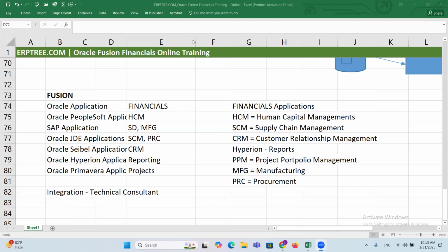Depending on the client's finance, you are gathering the requirement. The very primary core requirement that you gather initially may take a week, 10 days, 2 weeks, or 3 weeks also. It depends on the schedules, how many hours you are investing, and the availability of the client. You are interested as a consultant, but whether they are interested or not matters. In many cases, clients are not very much interested to implement Oracle Fusion.